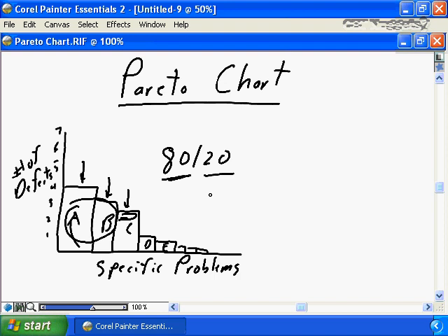But by doing that, we're dealing with the majority of the problems, and the others, the D, E, and so on. Yes, in an ideal perfect world, it would be nice to be able to eliminate them all, but because, as we discussed earlier in this nugget, time is money, there was always a focus on getting our project delivered as quickly as possible. If we can eliminate A, B, and C, we have dealt with the majority of the problems. So we're going to spend 80% of the time focused on the 20% of the problems, but the big hitters, that's going to ensure our project is going to deliver more successfully, that in quality control, we're focusing our time in the right areas.